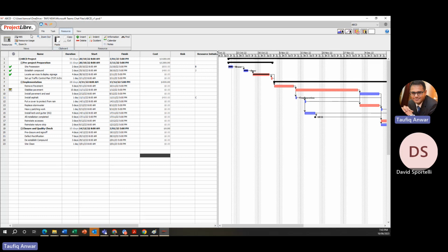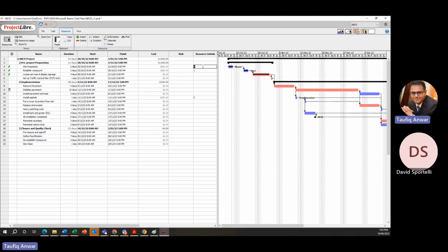When you allocate more resources, for instance 2-3 people, if I define a task as 2 or 3 days and I have just 1 person, it will still show 2 days. If I put 2-3 people, it will automatically reduce the time frame from 2 days to 1 day. You get my point? Because they are calculating it based upon that.